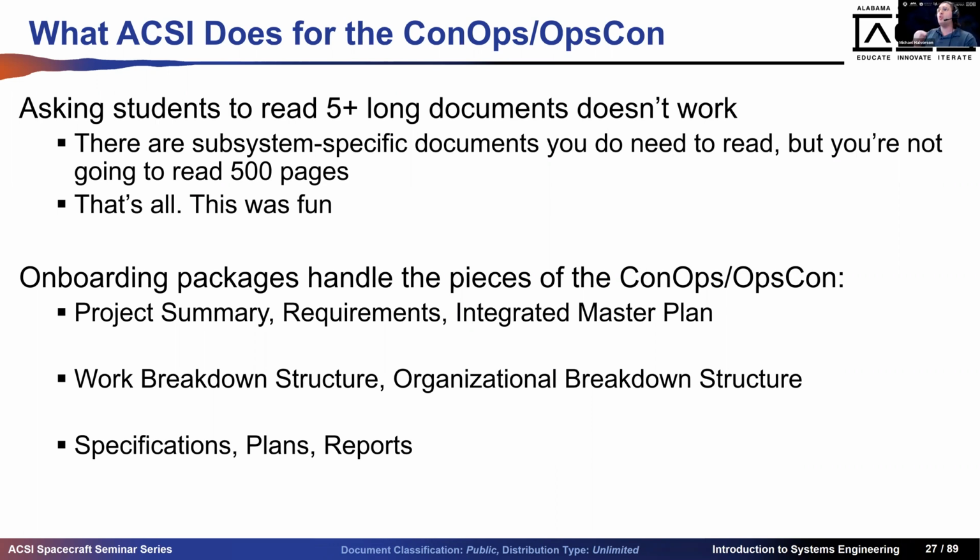When we talk about who is in the program, that's the organizational breakdown structure. And when we talk about decomposing who's in the program versus what that person with that role needs to do, that is the work breakdown structure, where we say these are the products that happen from point A to point Z in our life cycle. These are the maturation statuses that those products have. This is how we relate the product maturation statuses to review.